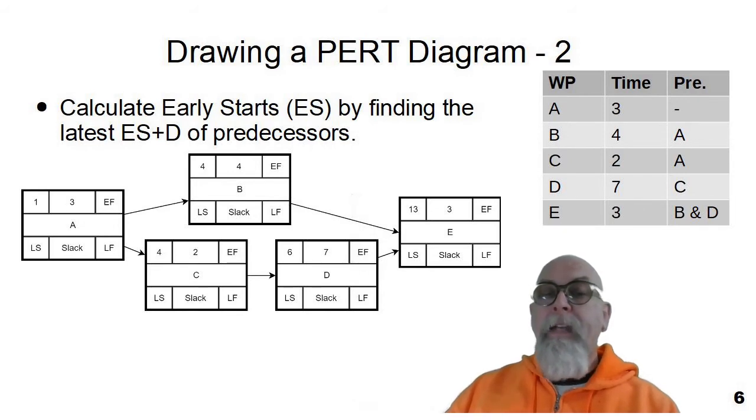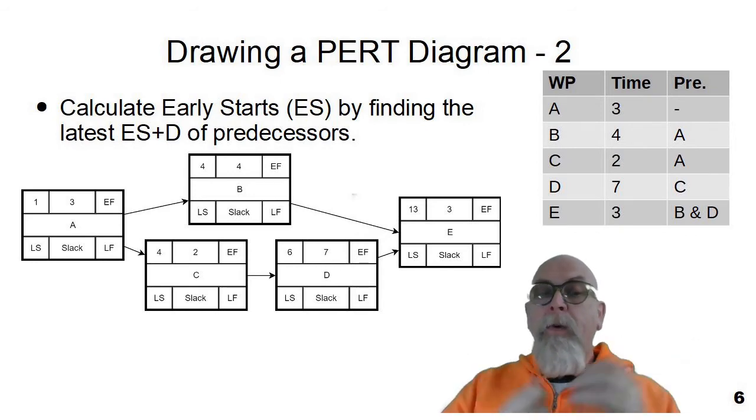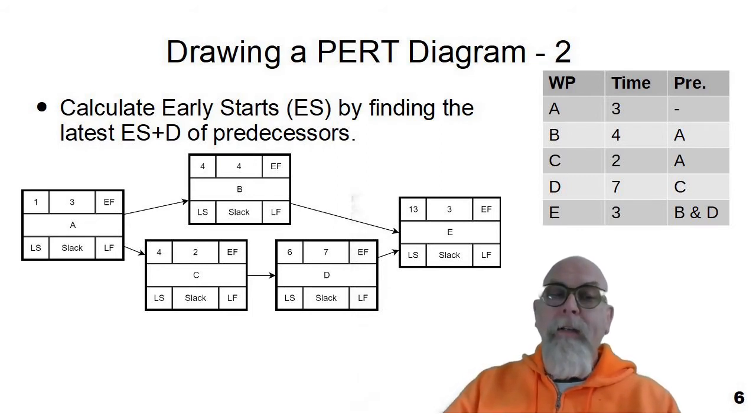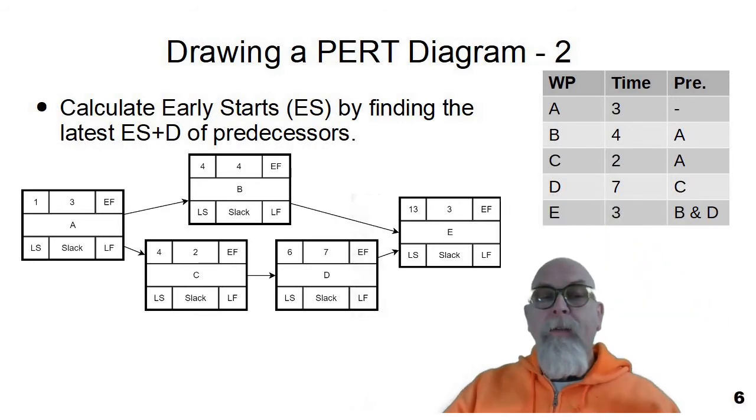Task D could start on day six. Task D will work on it for day six, seven, eight, nine, ten, eleven, twelve, seven days, which means that the earliest, the latest early start that we can do E is thirteen. Even though if you add four plus four from B, it's eight. But as I said, we use the latest early start plus duration of the predecessor tasks. So that's why for E, we have an early start of thirteen.